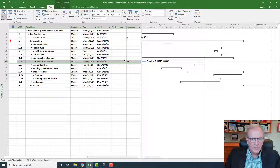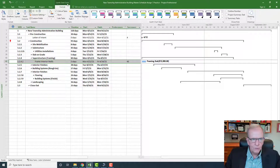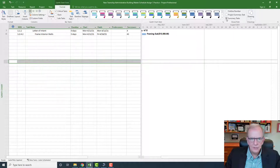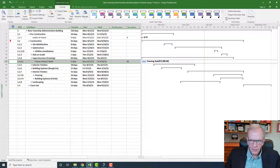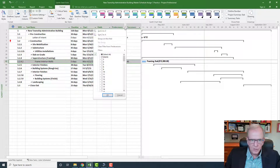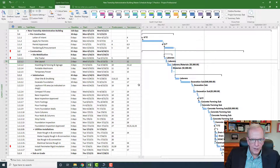By the way, if you've got a lot of headings and this annoys you, you could shut those headings off. Go to the Format tab, then Summary Tasks, and choose to show only activities. You can toggle it on and off. The big thing to remember is to make sure you remember you've put that filter on — it shows a little funnel icon — otherwise you might wonder where all your activities went.